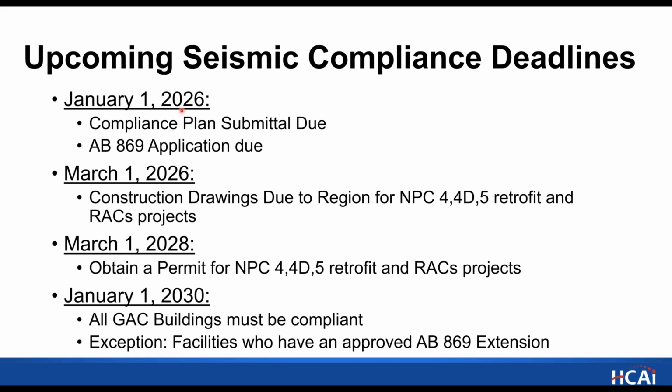By the end of this year, compliance plans are due, and also the delay to 2030 AB 869s for the eligible facilities are due. 3 months later, the construction drawings are due for SPC 4, 4D, and 5 retrofit. Or if your plan is to remove general acute care services from a building, the removal of acute care drawings are also due March 1st, 2026.